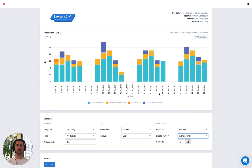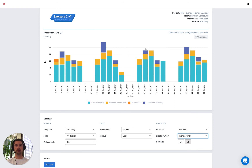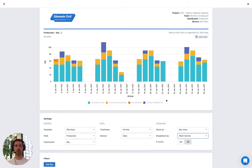On one day we can see excavation was 50 cubic metres and concrete poured was 8 cubic metres, but we also have a quantity recorded that doesn't have anything selected — an area where we'd want to go back and figure out what information was missing. For everything else, we can see purple, yellow, orange, and blue representing the different work activities. This is really handy: we can see the breakdown per day and identify days where no quantity was recorded for a particular activity. On the 18th of January, for instance, there was no conduit installed, which raises the question — why?